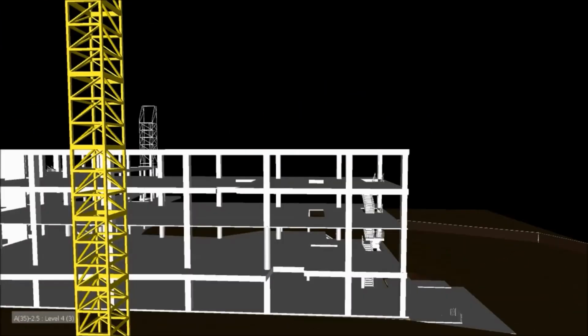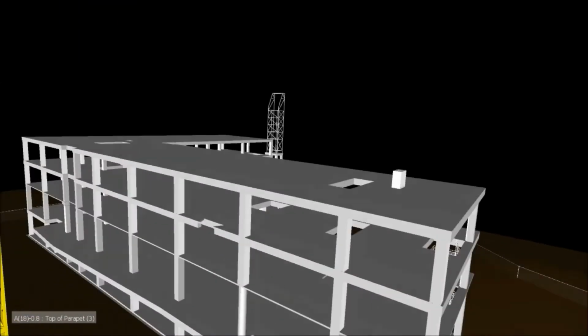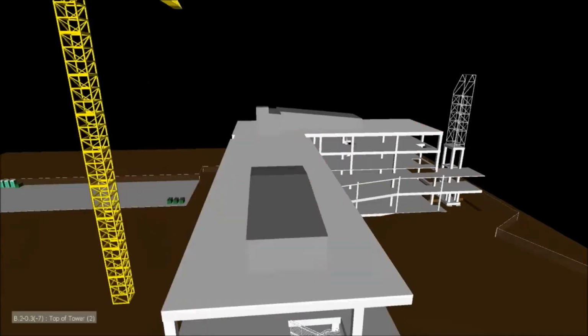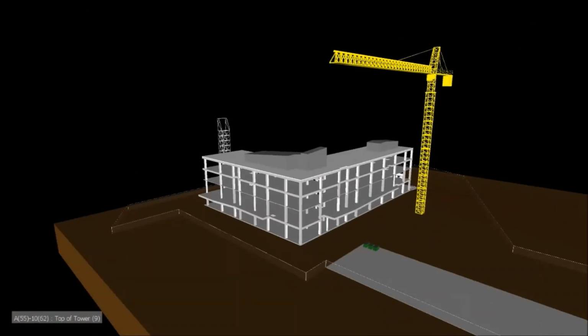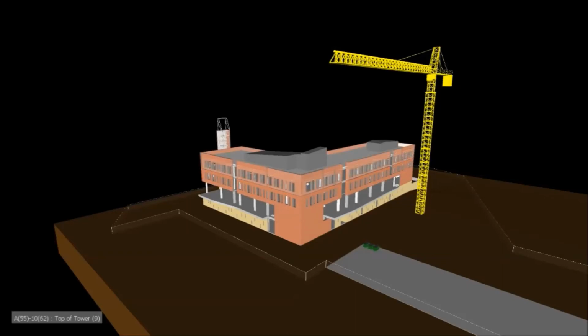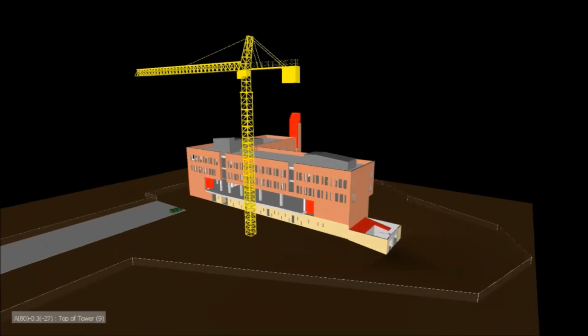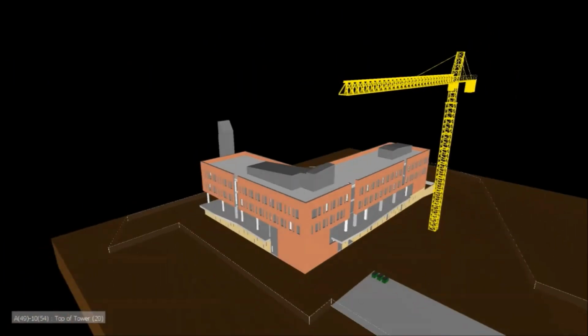Mechanical equipment will be placed on the building, including the air handling unit, chiller, and boiler. Penthouses will be installed, followed by the main roof. Brick and stone masonry walls will then be set from levels 1 to 4. Zinc siding and roofs will then be put on the building, followed by the exterior windows.